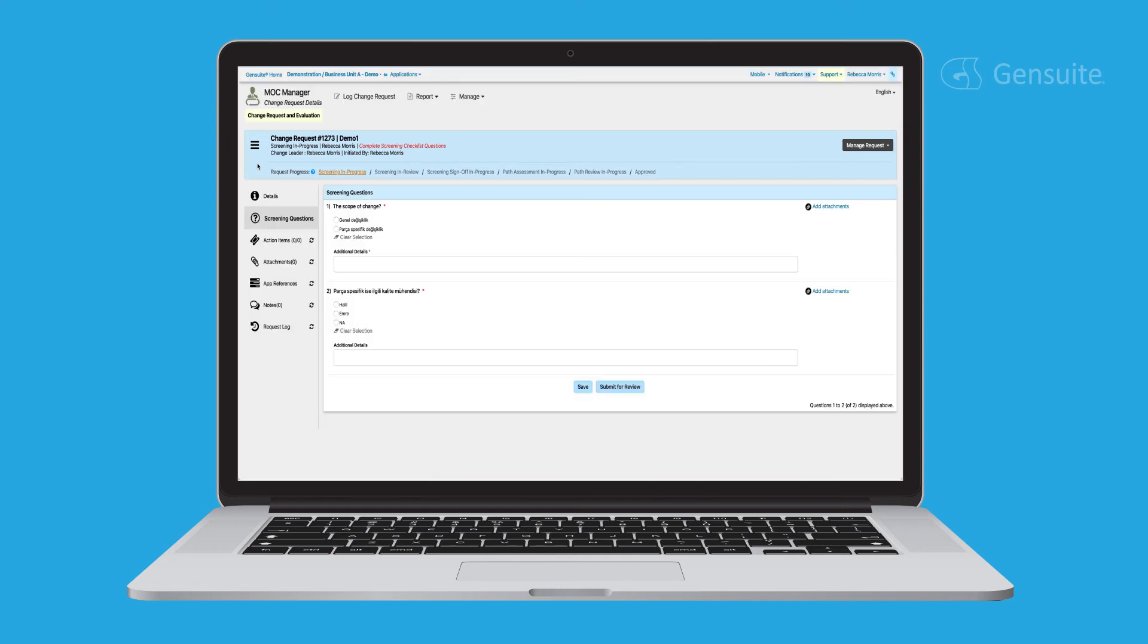Once a request has been opened, screening questions will gather additional general details about the request. Change requests must go through an initial screening process which then helps change administrators determine the EHS topics or paths that need to be evaluated before the change is implemented.